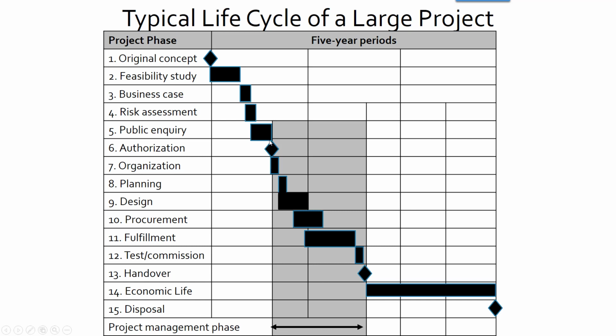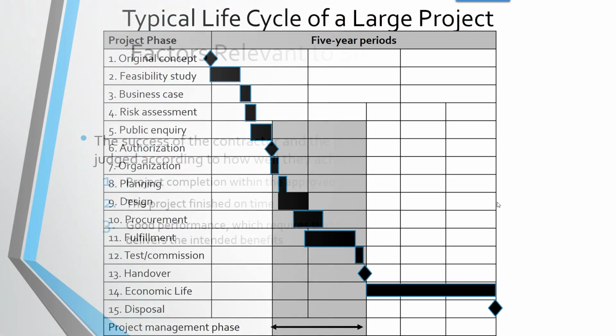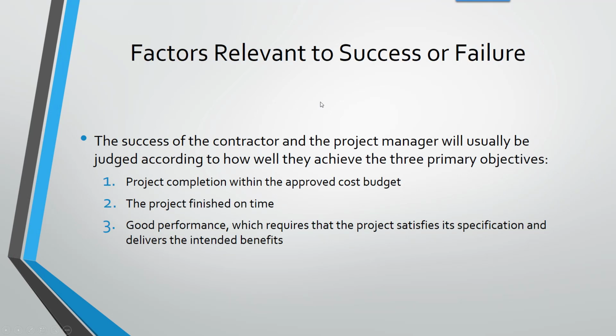Remember, when we go back, that we have to get that business case done and the approval before we even start project management. So this really shows you that lead up into the project management. You get this authorization and boom, now we can start organizing, planning, designing, procuring, fulfilling, testing, and then hand over to the owner. And then here's the lifespan. Notice it's outside of project management, and then eventual disposal. And this could be, I don't know, could be lots of time. So look at that.